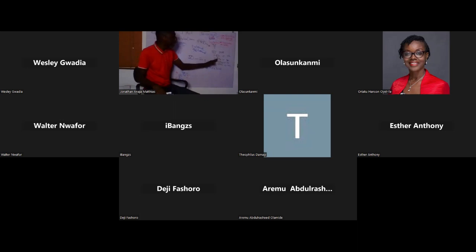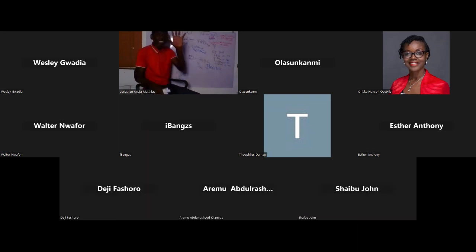So if I know that a beam should be about 30% of the cost of superstructure, and I have a bill of quantity from experience, I've done it 1, 2, 3, 4, Mr. Ini, and I have a QS who is very respected and experienced too. I'm trying to discover something, and I put it into a spreadsheet.